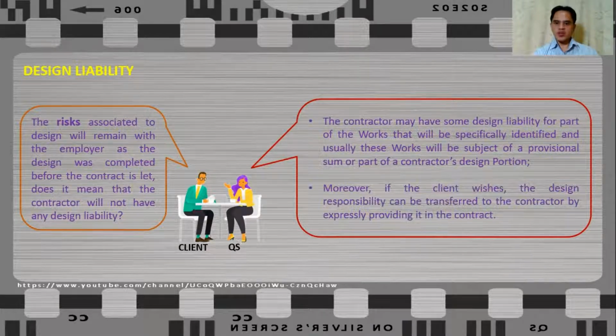Moreover, if the client wishes, the design responsibility can be transferred to the contractor by expressly providing it in the contract. So note, by expressly providing it in the contract. We will talk about the provisions of the contract in our future video about contract practice. Going back to this topic of design liability, if the client will transfer the design responsibility to the contractor by providing it in a contract, it will follow that the client will also pay an extra premium to the contractor for the transfer of this